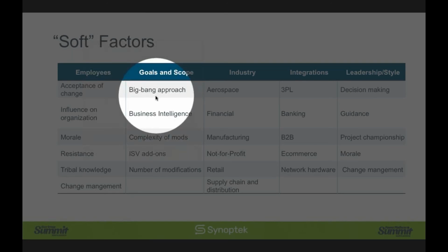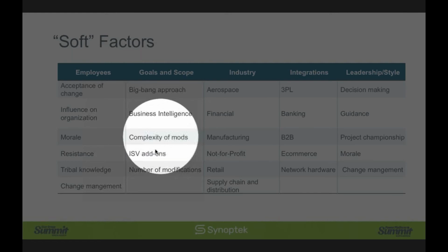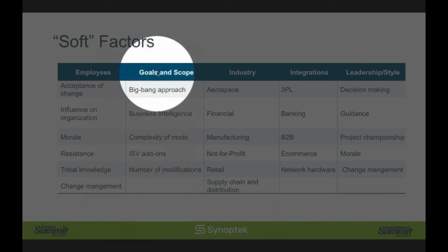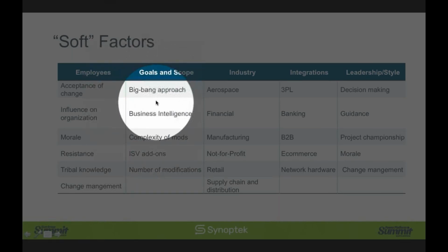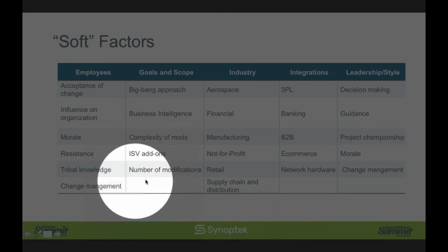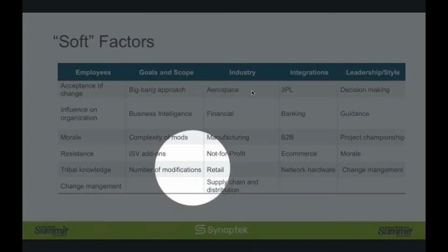Another factor that influences cost is actually your industry, right? Depending on what industry your organization fits in, your needs for the software is going to vary. For example, if you're strictly a financial institution who just use the software for the general ledger and the accounts payables and accounts receivables, you're not using the full breadth of the system. And therefore, the timeline generally is going to be a typically shorter implementation. And the number of resources that you need to support the implementation will typically be a lot less.